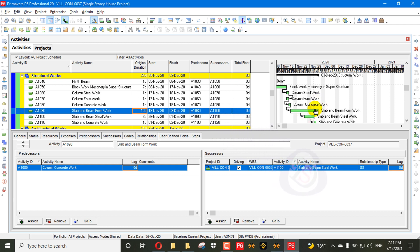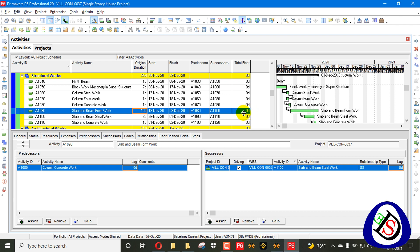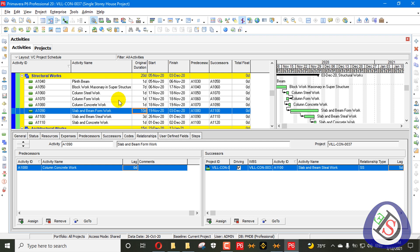How is it wrong? When you assign a start-to-start relationship and this activity increases in duration to 10 days, you press schedule and this activity has no impact on the schedule. It removes itself from the critical path because of the single start-to-start relationship assigned. So a start-to-start relationship in a successor impacts your current activity but affects the critical path completely — the float shows zero but the duration keeps increasing without schedule impact.